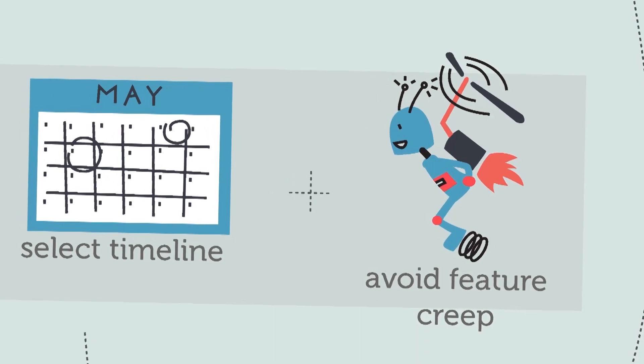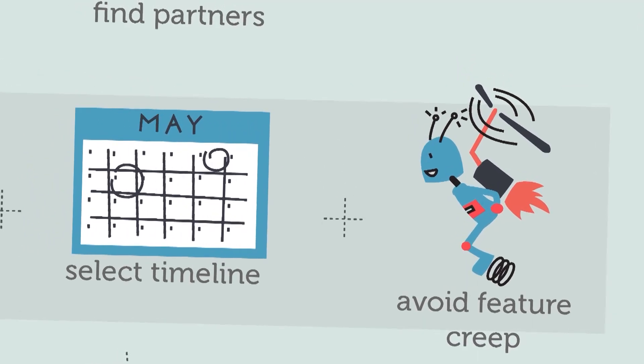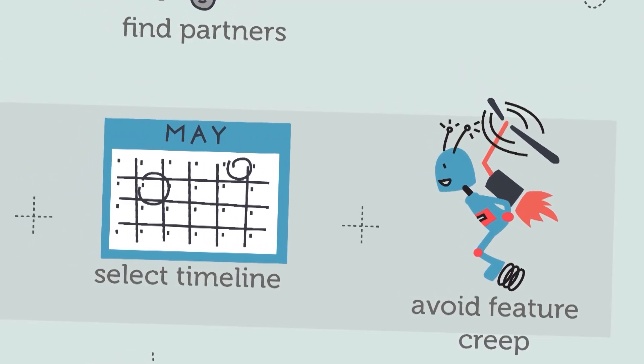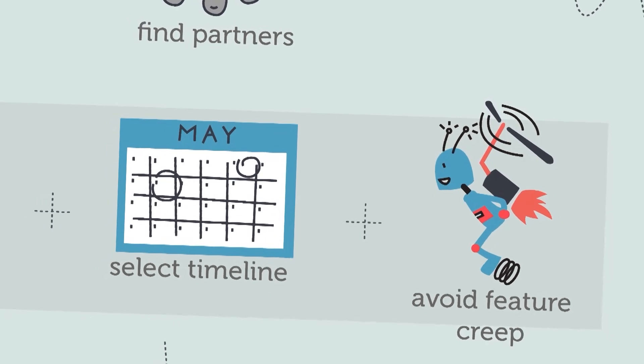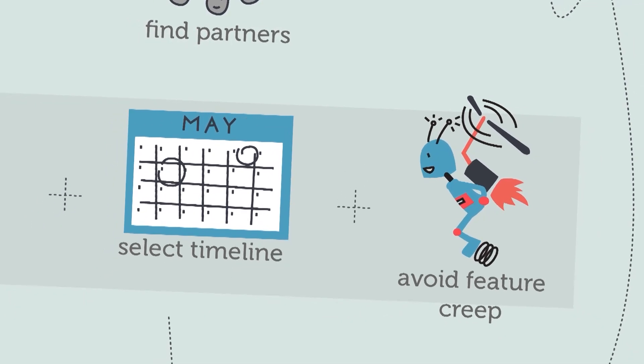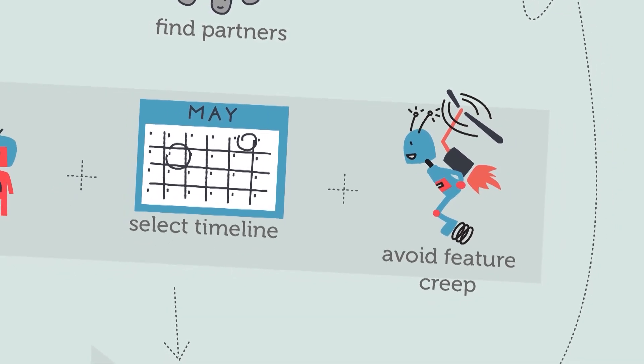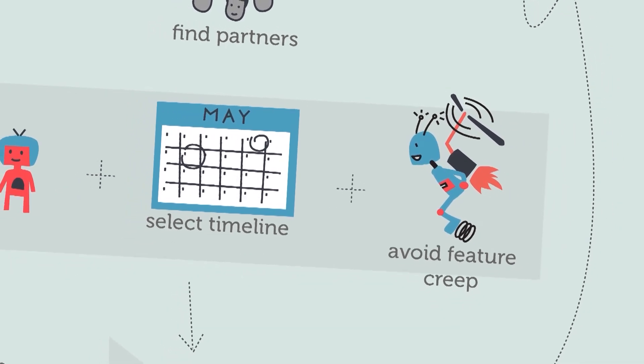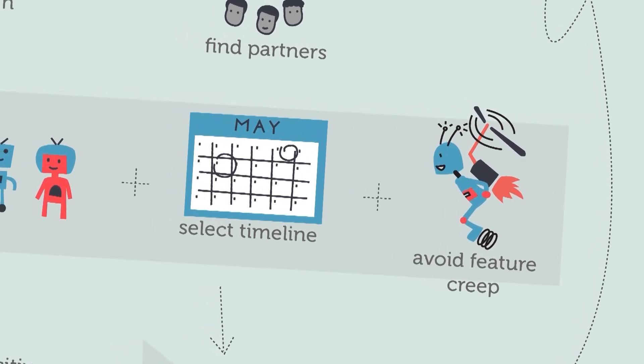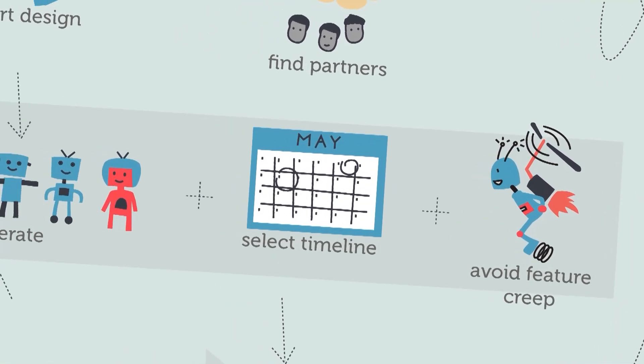Feature creep is when you keep adding more and more features because you're like, oh, this one additional thing would be really cool, and this one additional thing would be really cool. You keep adding things, but you never actually release it to anyone because you're so preoccupied with making it perfect. In reality, the first release of any product is not going to be perfect. It's never going to be perfect the first time.